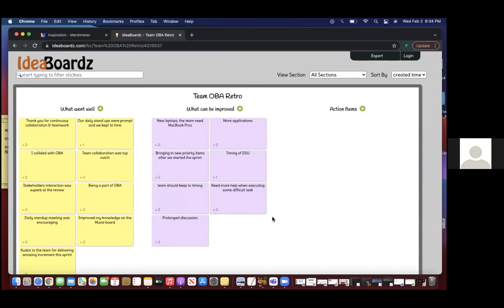Thank you, everyone. First of all, I want to say amazing job this sprint for being excellent. Without you, we wouldn't have been able to deliver this excellent increment. We'll talk about what happened in the previous retro, the action items there, first, before we come into the current retrospective. We'll talk about the two action items we chose for last retro. You can read them out and say, were we able to deliver on this? The people accountable for it will say, yes, we did this, or this one is still pending, but it has to be a continuous effort on the team. So you talk about the action items from the previous retrospective before you start the new one, to see if they were able to deliver value. Then we'll start the new one.